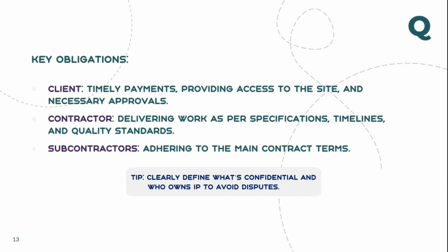Secondly, the contractor's obligations. If you are reviewing as a contractor, you know your scope of work, but if something in the contract is beyond your capacity, you have to highlight that point. Normally the client has to provide permits, such as initial building permits. But if they are asking you to take the permit, that's a big risk for you; maybe you haven't priced for that.